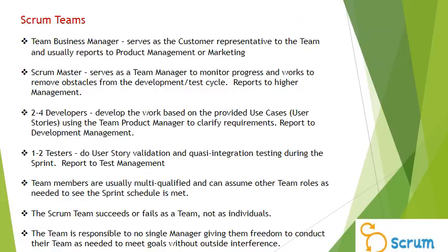Scrum methodology defines the concept of a Scrum team, where an organization may have several Scrum teams. A Scrum team consists of a team business manager who serves as the customer representative to the team and usually reports to management or marketing. A Scrum master, who is specially trained for the role, serves as team manager to monitor progress and works to remove obstacles from the development or test cycle.